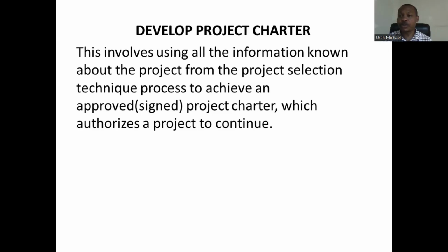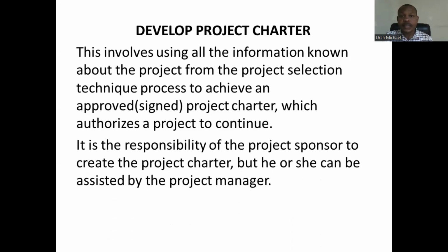You don't just jump into a project, you have to go through a lot of criteria to be able to select your project. So once you have done that and you're actually certified that this project is feasible, it's workable, it's viable, then you can now go ahead and design a project charter, an authorization document signing in the existence of the project. So now it's the responsibility of the project sponsor, all right, to create the project charter, but he or she can be assisted by the project manager.